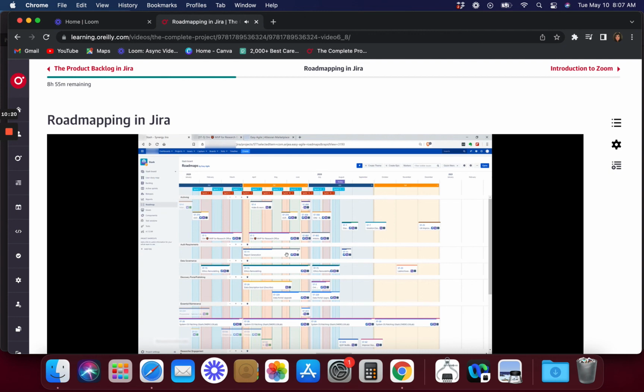And obviously a product roadmap is not static. It also moves according to the pace, the velocity of the team, right? So sometimes you might need to shift things around. Another thing you would consider as you're building your product roadmaps is dependencies. So sometimes you would say, okay, I'm not going to start this solution design, for example, here until I've completed the ONI MVP for Research Office first, right? And that's why this is sitting afterwards, after you have these epics, okay? So that's an example, all right?